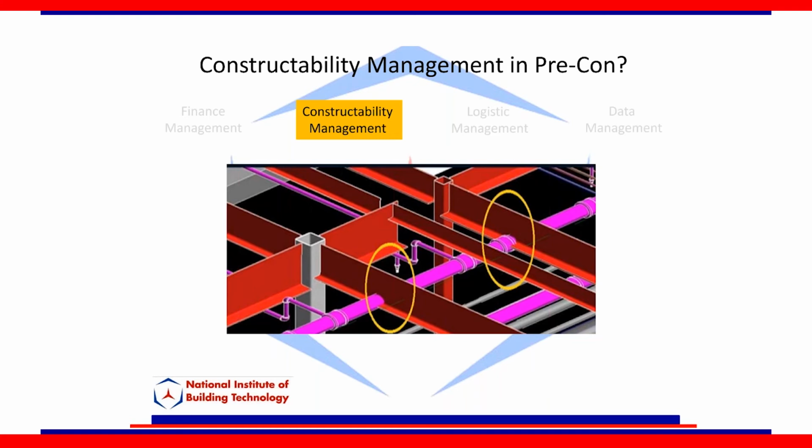So constructability management, basic, low-hanging fruit: do the clash detection. If you're not doing the 3D model, you're not understanding the issues and clashes up front. If we are going to go in the construction field and understand these issues after the fact, it's too late. You are wasting time, you're wasting resources, and it's very inefficient to manage and fix those issues in the construction field. No, we don't have time for that.